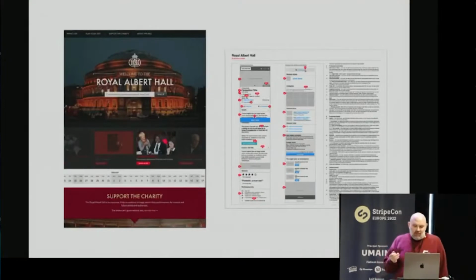One of the first things that we realized when separating out the front-end build from the CMS integration was that the design team was able to help lead the development, as the design team worked extensively with the client during discovery and had compiled all the wireframes. It also made sense for us to start building out pages first, too. We were then able to share working examples of completed pages with the CMS team, along with annotated wireframes to work from. This led to a significant reduction in miscommunication about the end result of a certain feature.